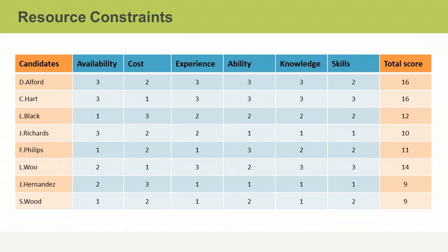You may consider placing a number of resources on a contingency basis, so that if you do experience an unexpected increase in workload, you can quickly call upon these resources. This will save you time in having to identify skilled employees at a moment's notice. Similar to a professional sports team, these skilled members will sit on the bench until they are called upon.